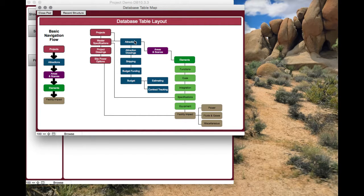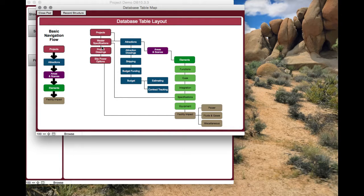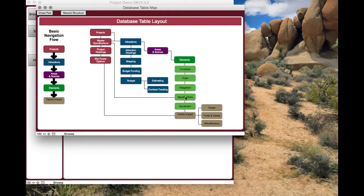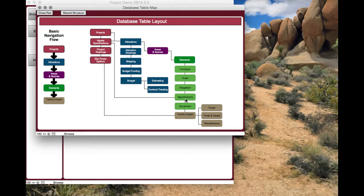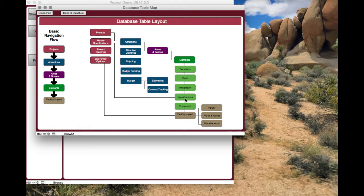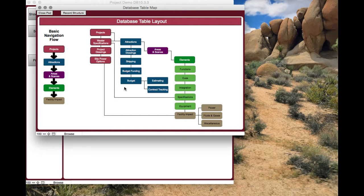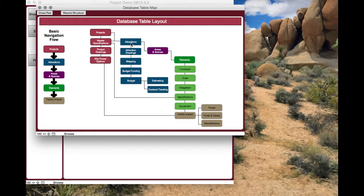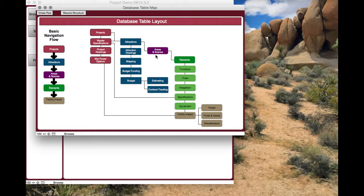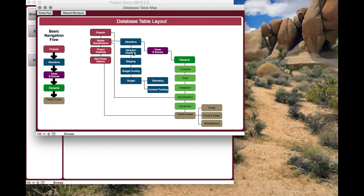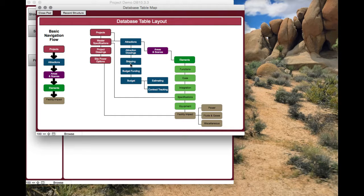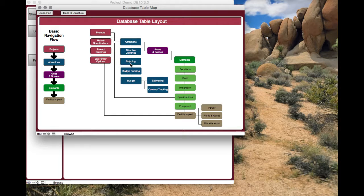Going back to attractions, you can access the master specifications from the attraction list as well. The specifications show up - you can tag them in the elements so that you can say each element needs which specific specification. You've got attractions, all the remaining drawings for the attraction, whether it's specifically for a scene or an element, goes into attraction drawings. Then you've also got shipping. You can track your crates, the number of the crate, what the packing list inside is, what date it was packed up at the shop, what date it left.